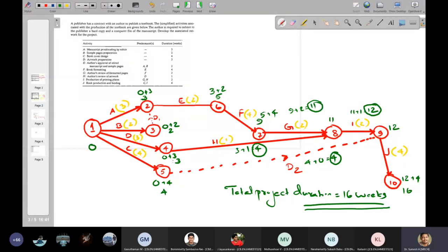So how to calculate the critical path? Now I have calculated that only in the forward pass for you to understand it. Now we have to see it in the reverse path also. Using that information, we can calculate the project duration, the path which is critical, the activities that are critical, and which activities will have slacks. Those things we can calculate by solving a network model like this. So the duration we will be calculating like this.